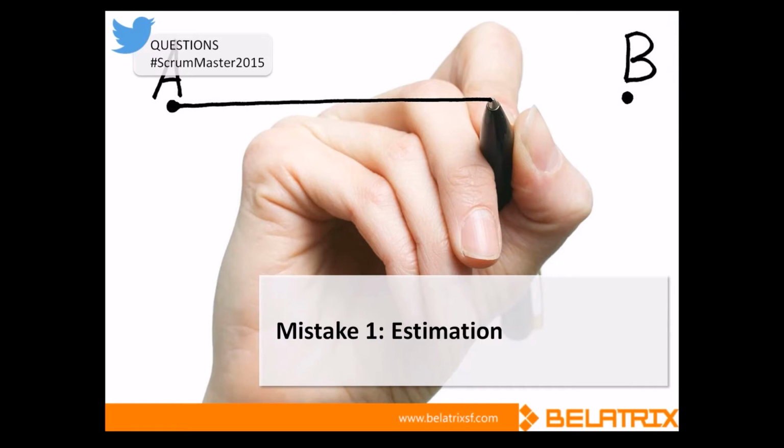Well, it depends on the project. For me, there are different concepts. You have, for example, a user story, if we call a user story a requirement, and you say, well, I think that we have 8 points for the user story, and then the points are just for the velocity, and hours are just for tasks. For example, I have a user story and I have different tasks for the user story. So the stories you can put in points, but the tasks sometimes it's better if we can put in hours.